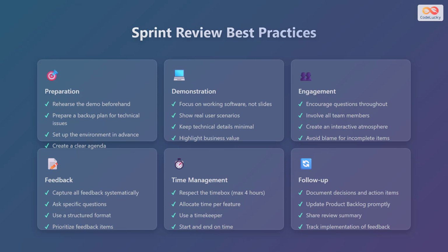Time management. Respect the time box, which is a maximum of 4 hours. Allocate time per feature. Use a timekeeper. Start and end on time. Follow-up. Document decisions and action items. Update product backlog promptly. Share review summary. Track implementation of feedback.